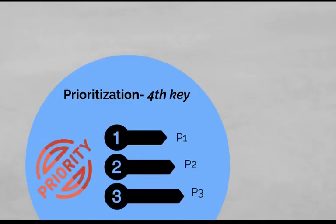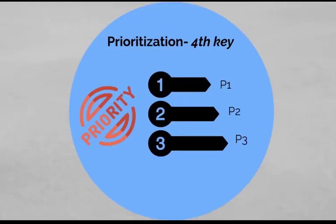Prioritization is the fourth key. A PM owns overall prioritization related to the product. When it comes to actual implementation, not everything may execute as per the original plan. PM needs to help prioritize the product features that need to be implemented first versus later. For example, in a good BRD, the PM puts priorities such as P0, P1, P2 across user stories and defines the minimum viable product for launch, while not having the right priorities may cause rework from the tech side. During implementation, if any blockers pop up that require choosing between multiple options, the PM rolls up their sleeves to prioritize and resolve the blockers.